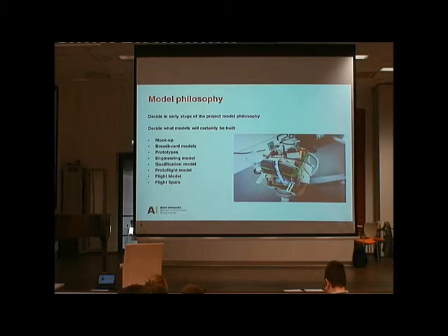before you launch one. So you have a flight model, you have a flight spare model, you might have a qualification model, which is actually shaken to death. There is an engineering model, which is almost similar to the flight model, and so on. So you should take a look at what model philosophy means, and how many models you can afford to build. If there is one very expensive part in your satellite, you might have to go with a protoflight model. You have just one part and you try to develop this into the full flight model.